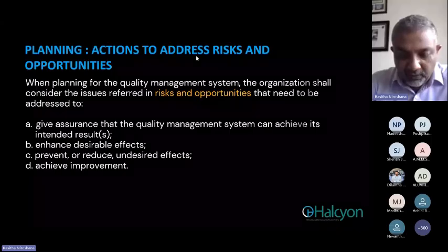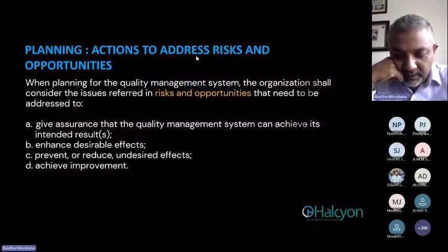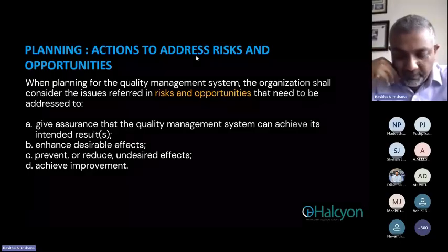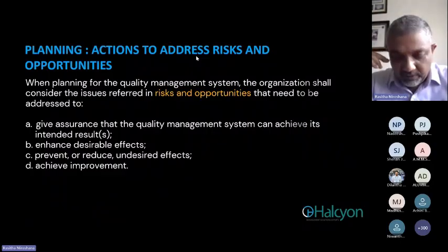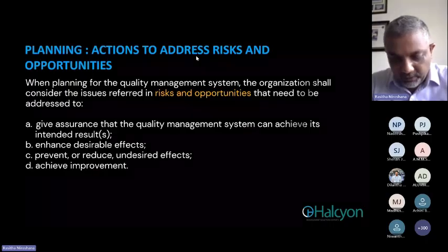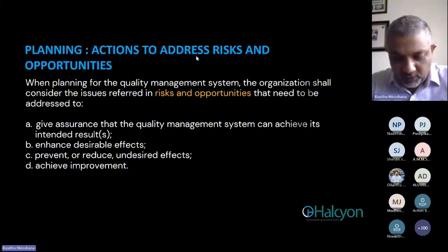And then Leshani. Action plan for laboratory. Laboratory setup infrastructure, 1 to 3 months. Ensure lab space, install essential equipment, proper waste disposal. Responsibility: lab manager, safety officer. Equipment maintenance and calibration every 6 months. That is actually ongoing work. Calibrate instruments, maintain logs, establish emergency repairs. Responsible: lab technician, equipment vendor. Safety and compliance, 6 months: conduct safety training, compliance with regulatory bodies, ISO, FDA, implement emergency protocol. Responsibility: safety officer. I think this is done by Leshani.